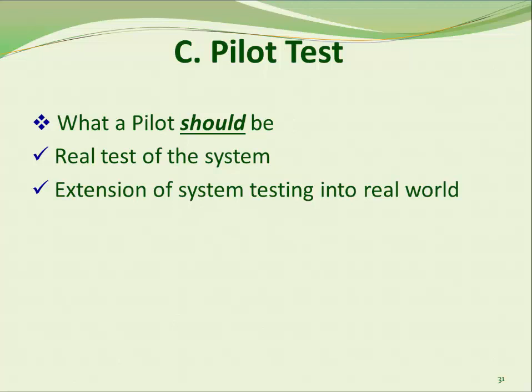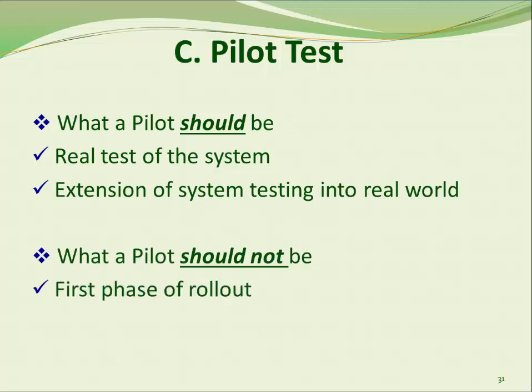State agencies must operate pilot projects until a state of routine operation is reached with the full caseload in the pilot area. The pilot also needs to include operating all components of the system in a live environment. Pilot is not simply the first phase of rollout, nor a formality to proceed. For example, a quick run of the system for 2 weeks in one local agency. The main purpose of the pilot test is to catch potential problems before they become costly mistakes.